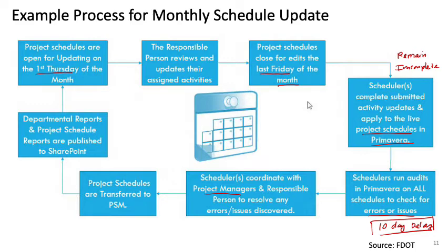And once the issue is solved, you get a new schedule, right? So basically you're changing the plan on the remaining activities. You're changing the logic, you're changing the production rate, you're changing the duration of the remaining activities so that you can solve all the issues. So once the issues are solved, that means you have a new schedule.